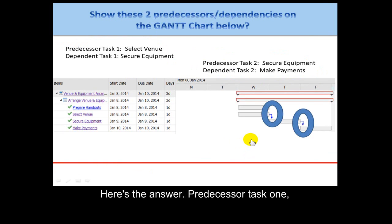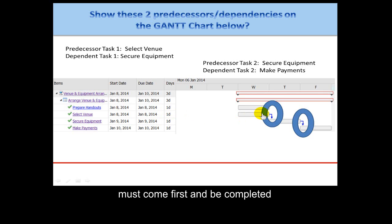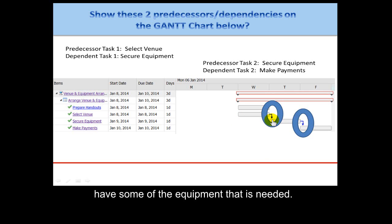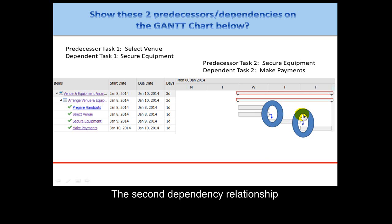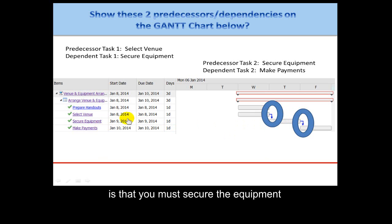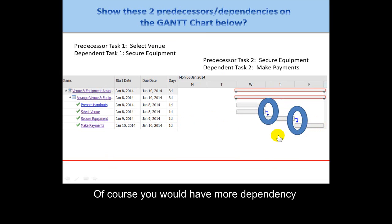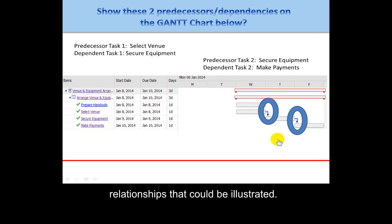Here's the answer: predecessor task one — selecting the venue — must come first and be completed before you can secure the venue and show the equipment, because certain venues may already have some of the needed equipment. The second dependency is that you must secure the equipment before you can make payments for it. Of course, there would be more dependency relationships that could be illustrated as well.